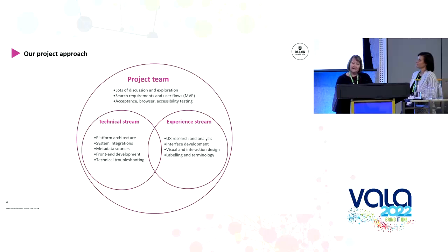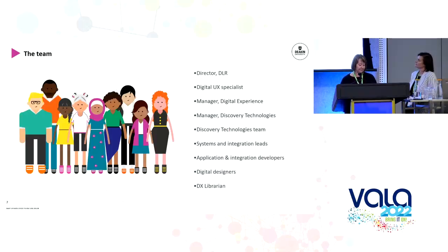This was an in-house research and development project with a mandate for work to be undertaken in addition to other project and operational workloads. Project timelines were therefore extremely flexible, with an original projection of 6 months extended to more than 18 months to this point. In the very beginning, we decided that the best approach to manage the work required was to use a streamed approach, creating a technical and an experience stream.